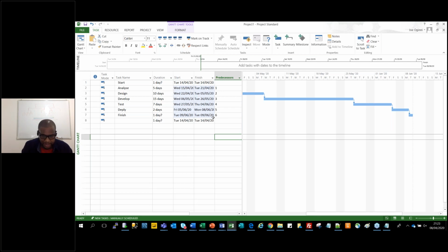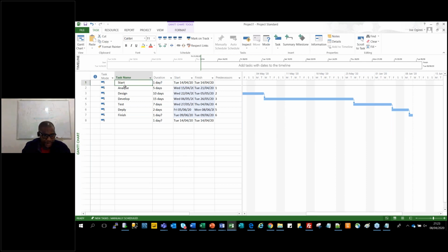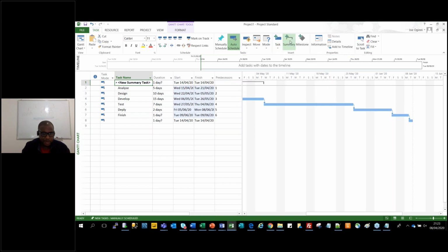We're not going to do everything from end to end. So one thing I want to quickly do now is sub-categorize them. So start, analyze, and design. It's a category. So I'm going to click on that and summarize. See the summary there? Click on summary. It gives you another line on top.